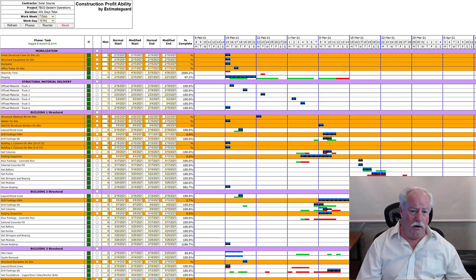So we scheduled a call with the subcontractor to let them know, you are having some major problems, you're delaying our project, there's liquidated damages at the end, and this is a very important client for my customer, and we need to complete on time. That's why they hired us, because we have a history of completing projects for them on time.